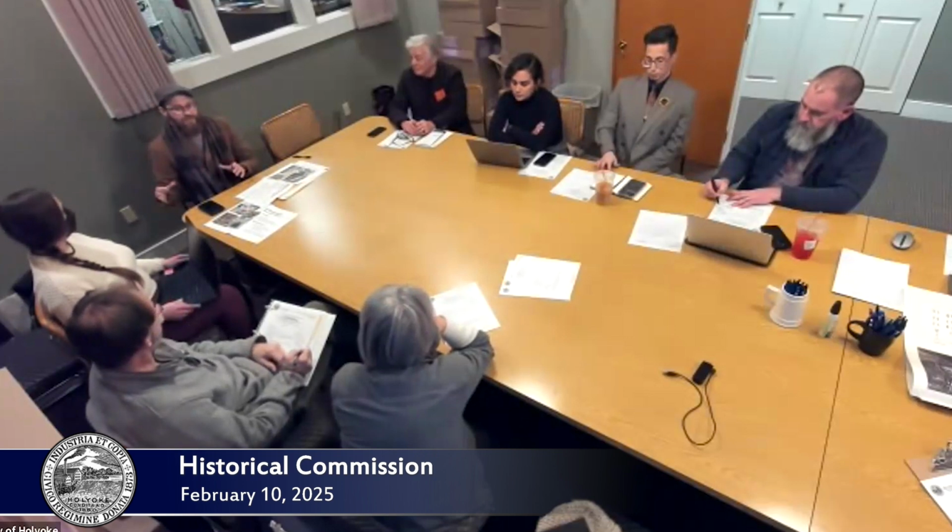So it's this really cobbled together process. That's just one of the funding layers of a very complex funding stack. All those parties are ready to close, and if we do not get these tax credits, it really does delay the whole project. So that key piece is the key piece of the puzzle and why I'm coming to you for a letter of support here today.